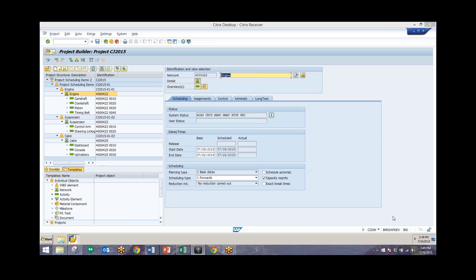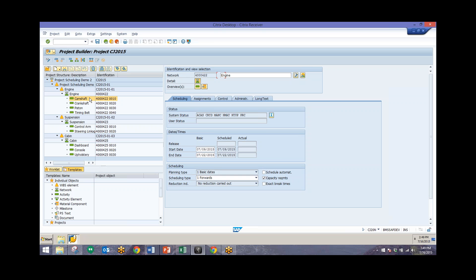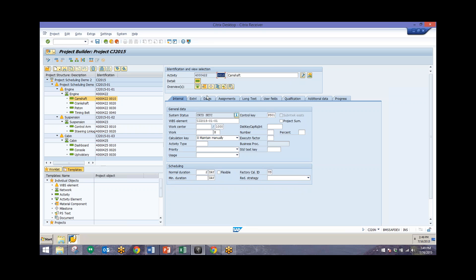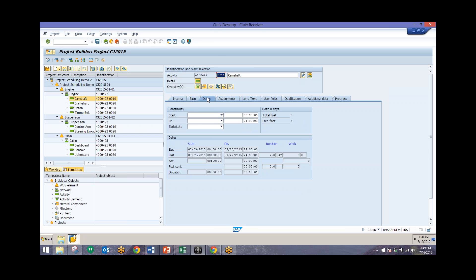Another major concept related to scheduling in Project Systems is the idea of float. There are two types of float: total float and free float. We can view both of these in the dates tab of one of our activities. Total float is a time interval by which you can shift an activity from its earliest start without exceeding the end date defined in the network header — in this case, the engine network.